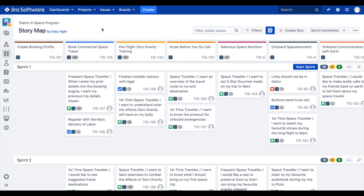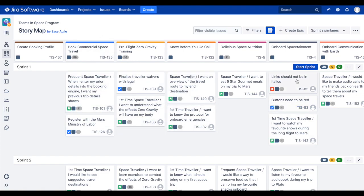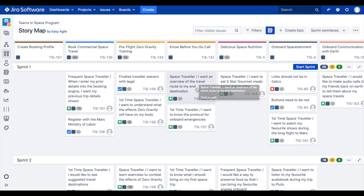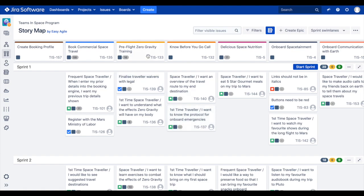Beneath each epic on our backbone, we see the user stories that have been linked to that epic using the standard JIRA epic link. These stories appear from top to bottom in their rank pulled directly from the Agile board. We can also create new stories linked to the epics in our backbone.